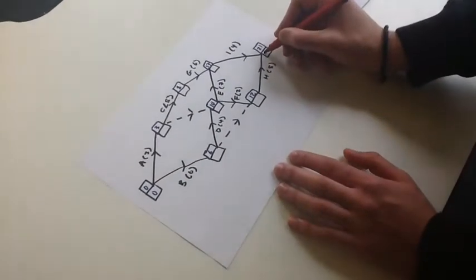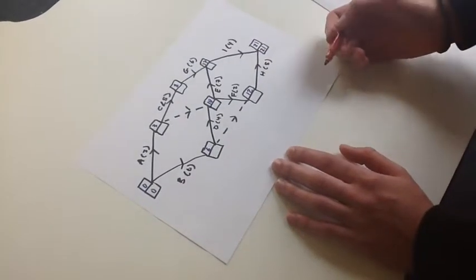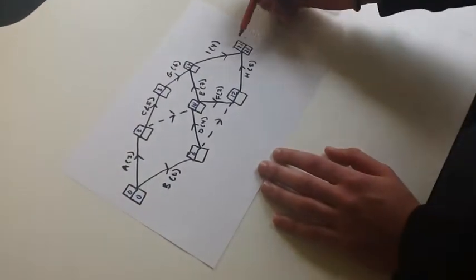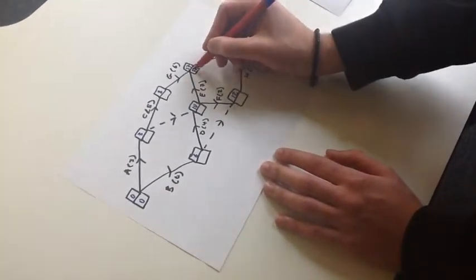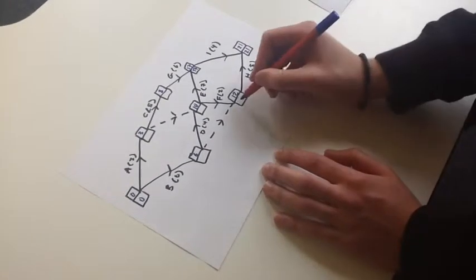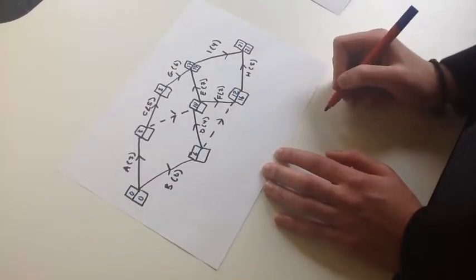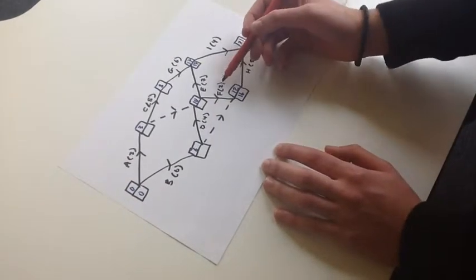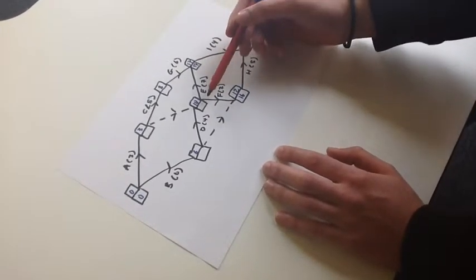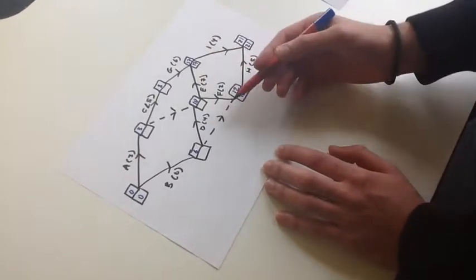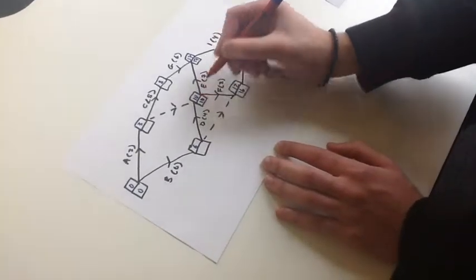The latest time goes into the bottom box, so this one will obviously be 21. So you do 21 minus 4, and that gives you 17. 21 minus 5, that gives you 16. And for this box, 16 minus 2 gives you 14, but 17 minus 7 gives you 10. You have to pick the lowest value, which means 10 goes into this box.